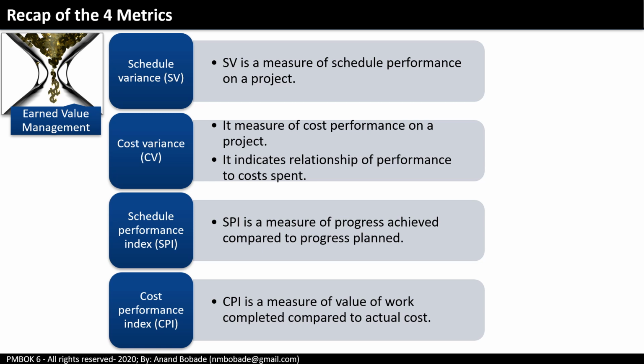With them, you can translate raw project data into clear insights, answer management's questions confidently, and make the right decisions. Remember, negative variances and indexes less than 1 mean trouble. Positive variances and indexes above 1 mean your project is in good shape.